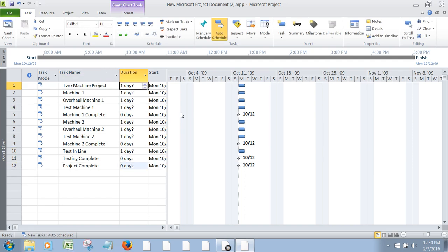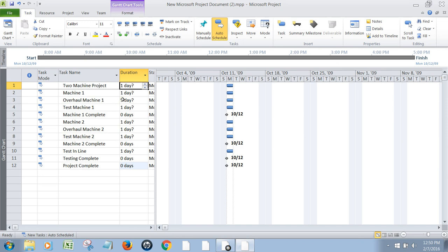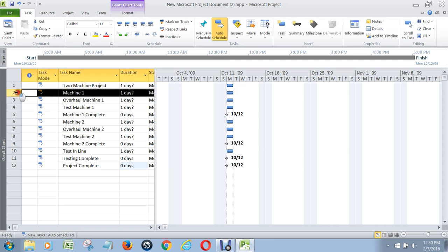Now we have all this typed in, and we need to outline the project so that everything is summarized properly. Because you want your project to read almost like an essay with headings and subheadings. So the first thing we want to do is make the two-machine project at the top here the project summary task.